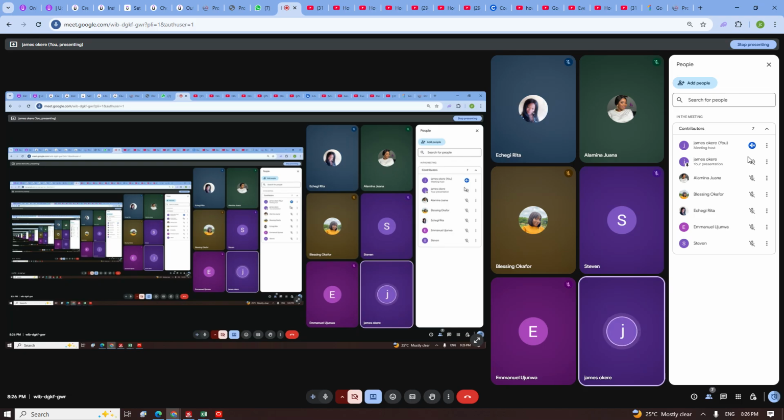You see, they did not give him detailed information. Either they give you a summary, or they give you the introduction. It's left for you to start using your brain to analyze, okay, if we can do 150 in a day, which means in 2 days we are 300, in 3 days we are 450. Then 46,000 something meters, how many 150 meters are there? You divide it. You can now know the total days it will take you to finish that amount. So this is some of the information you'll be getting.